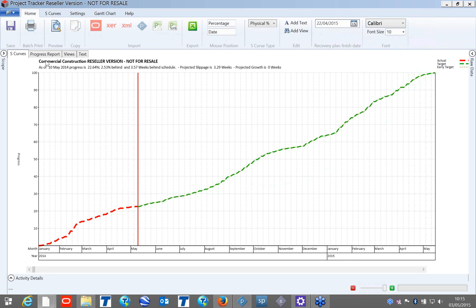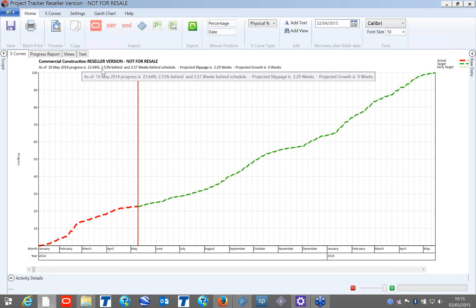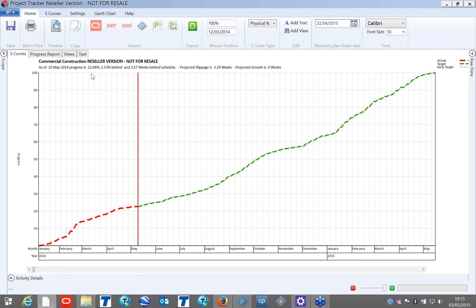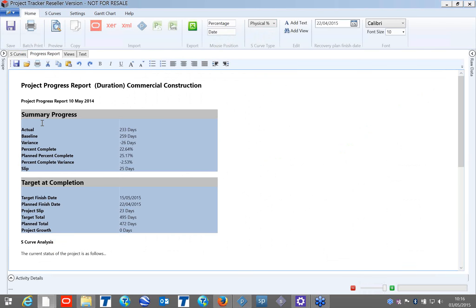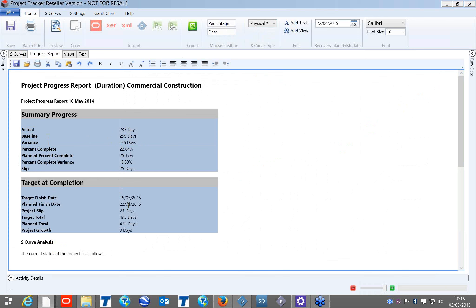This report is based on physical percentage. On the second part of my report, it tells me that actual completed is 233 days, and in the baseline it is 259 total. With the remaining part, the variance is 26 days. Percentage complete, planned percentage, slippage, and targeted completion — these are the dynamic values which can be seen directly.